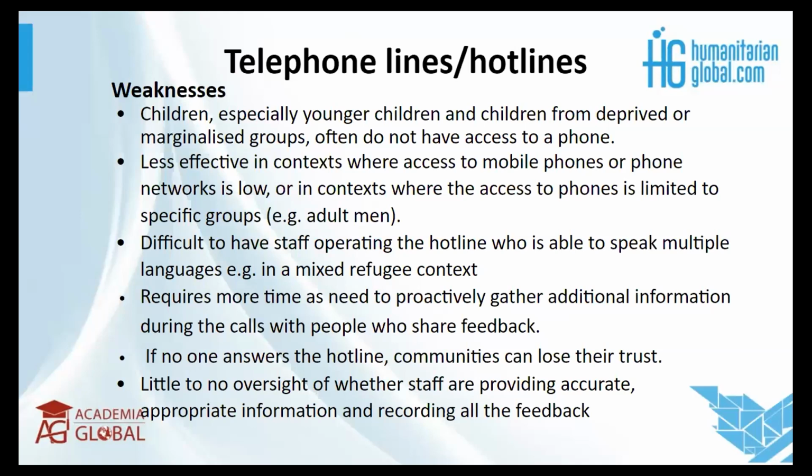Then lastly, there could be little or no oversight of the staff who are actually manning this hotline in regards to providing accurate and appropriate information, and also recording the feedback, which, as I've highlighted, is very important. So once the person who is charged with being responsible for this hotline does not record, firstly, the feedback, we are not able to monitor, so it loses its effectiveness.